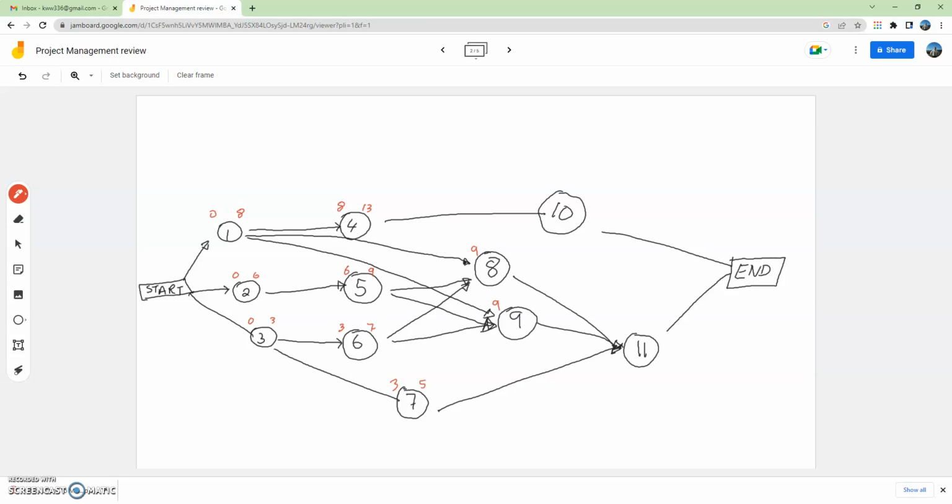It's going to last for 7 weeks, so that's time period 16. Activity 9 lasts for 4 weeks, that's 13. And then we're good with that. Activity 10 only occurs after activity 4, and that goes for 4 weeks, so that's 13 to 17.